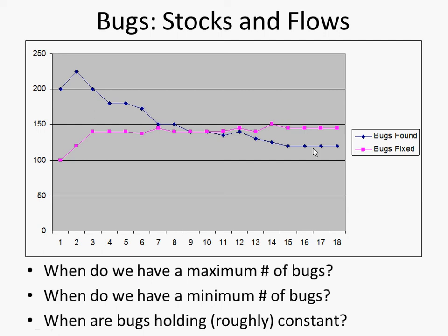This is a very common thing for projects. And knowing where you are on this curve is helpful to understand the likelihood that the project will converge in time, say, for the next milestone. Here we may be dealing with a timeline of 2 to 3 weeks.